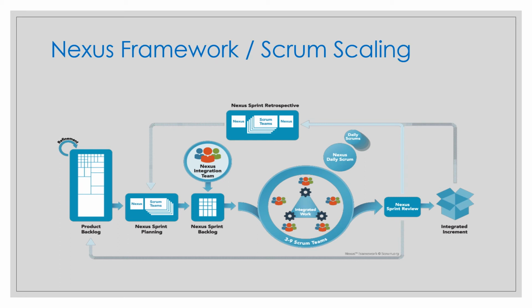The only requirement is that the work should be integrated by the end of the sprint. It doesn't matter that for team A, sprint 1 is 13 days and sprint 2 is 14 days, and for team B, sprint 1 is 7 days, sprint 2 is 8 days, and sprint 3 is 10 days. If all the teams have the same sprint duration and start and end dates, that is pretty good, but it can also go the other way, as we discussed.